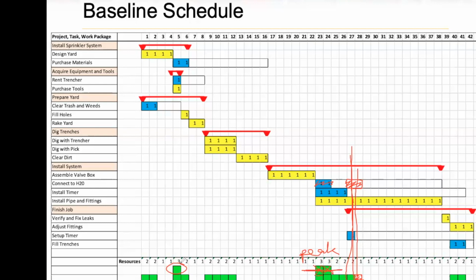But you got this one, right? You got the resource leveling idea. So you look at the labors and then you look at your lab or designer, how many hours she's booked, and then you try to use the slack time to make it. Why do I use the slack time, guys?